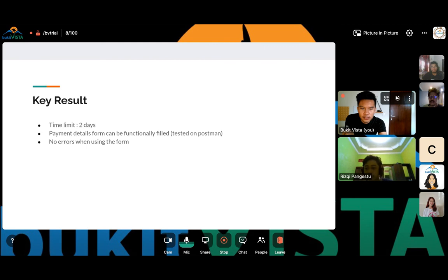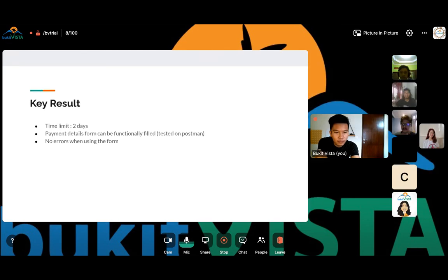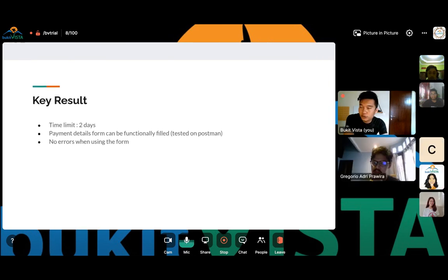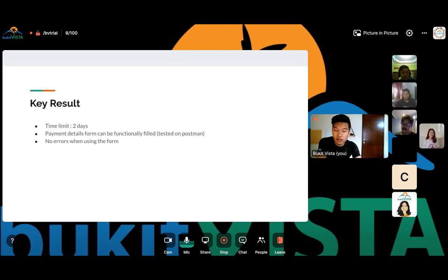Okay, that's it then for this presentation. Thank you, everyone, for the interns. I'll see you around. Just ping me if you have any questions. And I think we also have a stand up today at 5. So don't forget, don't miss it. Lukman, Adri, S2, please join our stand up. It's a simple question. What did you do so far? And then what's your current work? And what problem are you facing on the current work? It will take only 15 minutes, so see you there.